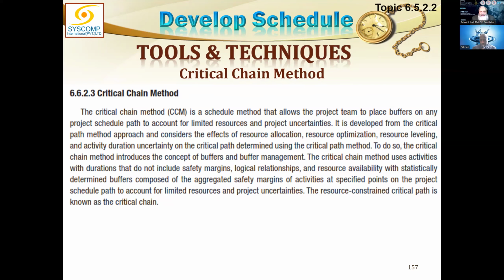So, if a project manager ignores the non critical activities and only applies the critical chain method on to the critical path activities, his job can be done. If the whole project is taking 60 days, and let's take another example. If it takes 100 days and you have 20% of padding considered, that means it now can be done in 80 days. Got it? Yes, sir. And those 80 days must be cut from the critical path activities only.